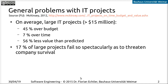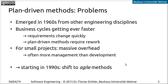There's obviously a problem with planning IT projects, especially large ones. Part of the reason is that plan-driven methods for software engineering were developed in the 1960s when the field started, and they were based on other engineering disciplines like construction or mechanical engineering. Those fields usually don't have quickly changing requirements, but this is a big problem in software. Business cycles for software are getting more and more rapid, meaning requirements change ever more quickly, and if you use a plan-driven method you always need to rework your plan.